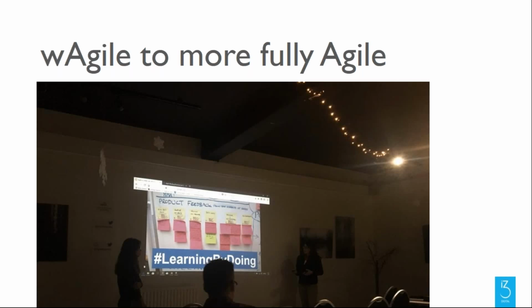This was an event I went to in Leeds prior to Christmas, which looked at learning by doing within an Agile framework within the sort of teams that they worked in. And ultimately, if you work in a waterfall where you're trying to find everything up front, you're relying on people who are very quick at picking up information to get all that information out of their heads into specification documents, and then to understand what everybody else is trying to do and spot problems before they happen. Whereas actually, if you work in an Agile way, it's better for the people working on the project, because they can look at what's going on in terms of all the different teams, find areas where there might be conflicts or duplicated effort, identify them, and then work from there to actually deliver a better project.